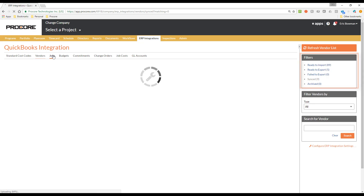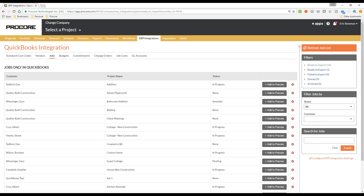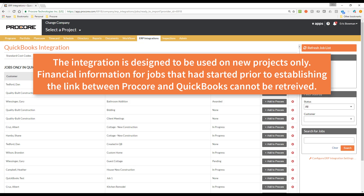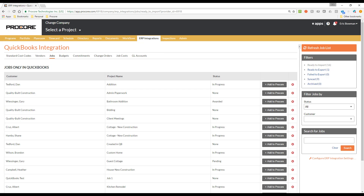Now let's look at the Jobs sub-tab. You can see that we have the same filters here that you saw on the Vendors tab. The Ready to Import filter shows the jobs that are currently set up in your QuickBooks accounting system. If you want to add one of these projects to Procore, all you need to do is click the Add to Procore button. This will add the job to your Procore project portfolio and it will be displayed with the green ERP linked banner. If you will not be adding the project to Procore, simply click the Archive button. It is important to note that this integration is intended to be used on new projects going forward only — it is not intended for jobs that were already in progress before the integration was established, because the historical data from QuickBooks will not sync up to Procore.